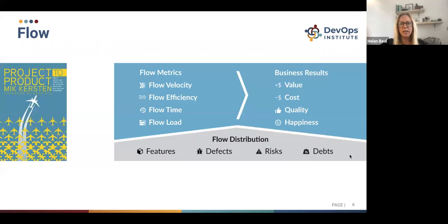So if we're thinking in that way around value streams, there's some different sorts of metrics that we might want to think about. And when we do value stream mapping, the first metric we really collect is the cycle time. And we do that by estimating our touch times, the time it takes elapsed to do any part of the process in the value stream, and then the wait time or idle time, so the between the step time. And then we add our touch time and idle time together, and we get cycle time. And this is very similar to our flow velocities.